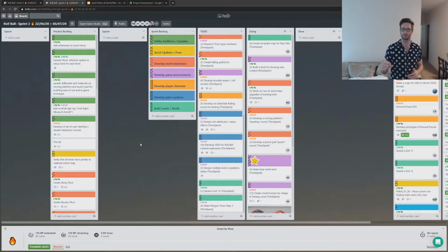And then each of those will get down to a more realistic story point estimation, which I will show you how to code in these things, because the plugin does analyze the title to give us these metrics. A story point for us will be how many hours we estimate it will take.